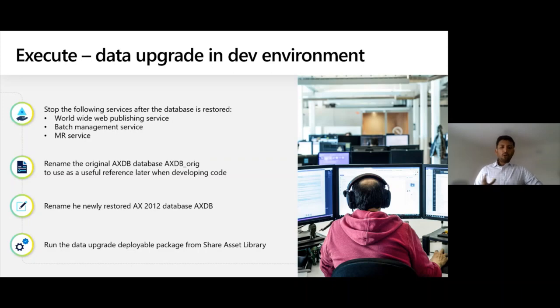The major assumption that we are making with this activity is that before you start all this, you have done your code upgrade and you have updated code ready with you. So even before you restore the database, I would recommend you install the upgraded code base in your dev environment, and then start the process that I described in this slide and the previous slide. Once you have the database restored and named as AXDB, we will look at how we do the data upgrade itself.